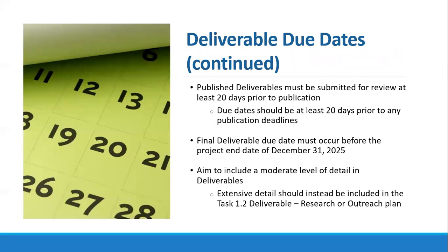Finally, some more notes here. You saw, I think, in one of those previous deliverables that there was a lead time of 20 days for any published deliverables. There was some published materials listed with one of those deliverables. This is a requirement that we actually are forced to abide by. So we do need materials quite a bit in advance.